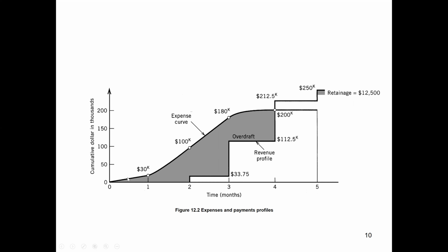Now, by including a 25% profit, we see that there will be four payments. For the first payment, the work done during the first month, the contractor will submit to the consultant after the first month. Then the consultant and the owner will have 1 month to check, verify and release this payment of the first month. So the first payment that the contractor is going to receive from the owner will be 33,750, which we have just calculated previously. Here it's divided by 1,000 and shown in thousands, so the first payment will be 33.75, or 33,750.